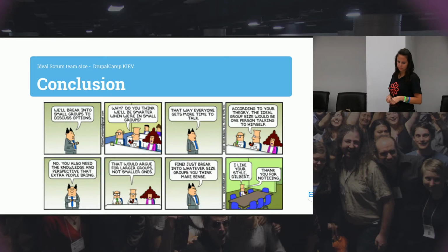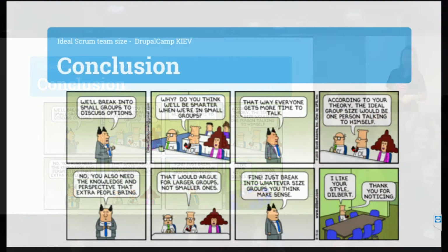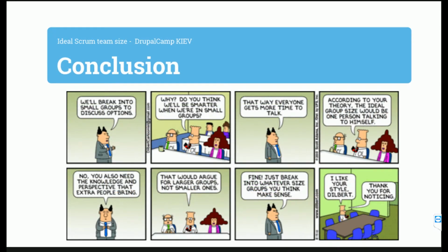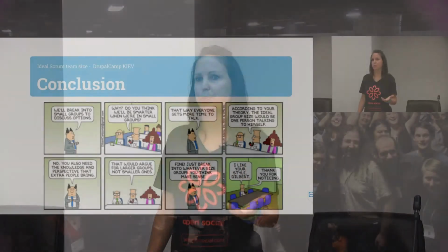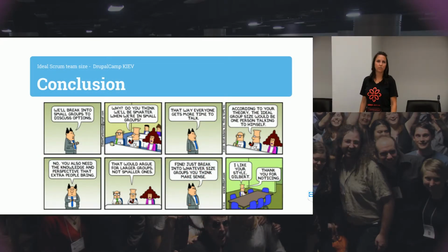So I think if you hear my story, it all comes down to the same thing. I think your team becomes too big whenever you see that you're creating subgroups within your team. It sounds really simple, but we just had to experience it before we were actually okay with it. Nine is definitely, even nine is a bit much